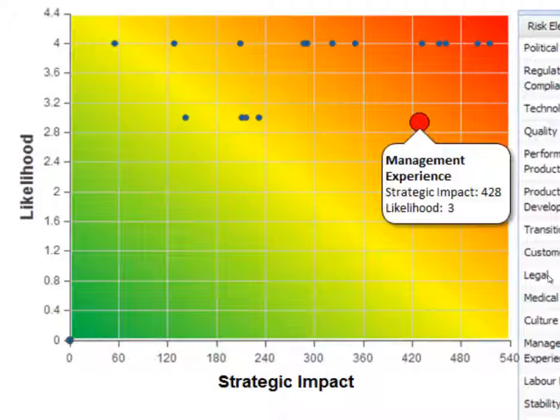And it's based on the specific priorities of those objectives for this year. Now, this chart can be used in a number of other ways beyond your traditional risk approach. For example, scenario planning. If you laid down alternate weightings for those strategic objectives, these dots would move across the sheet and give us a view of where risk lies in those different scenarios.